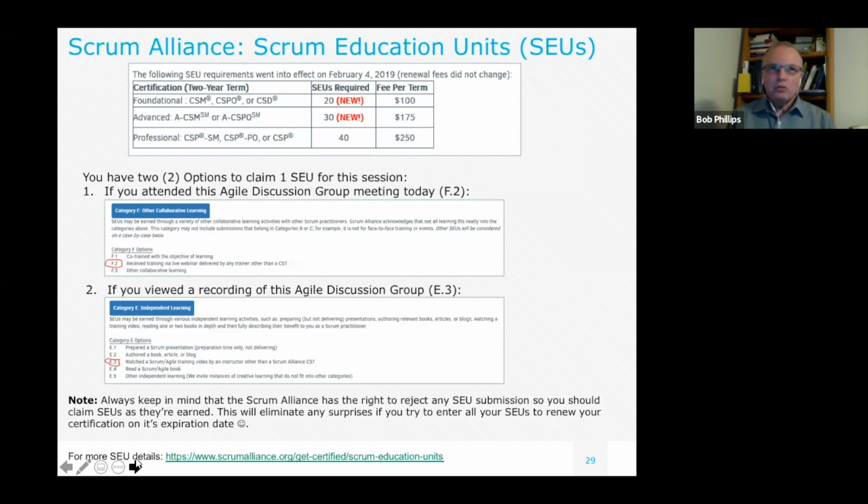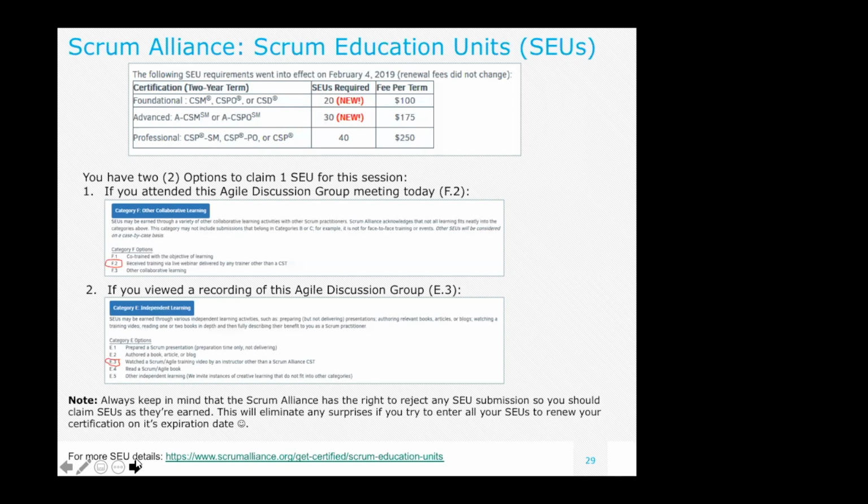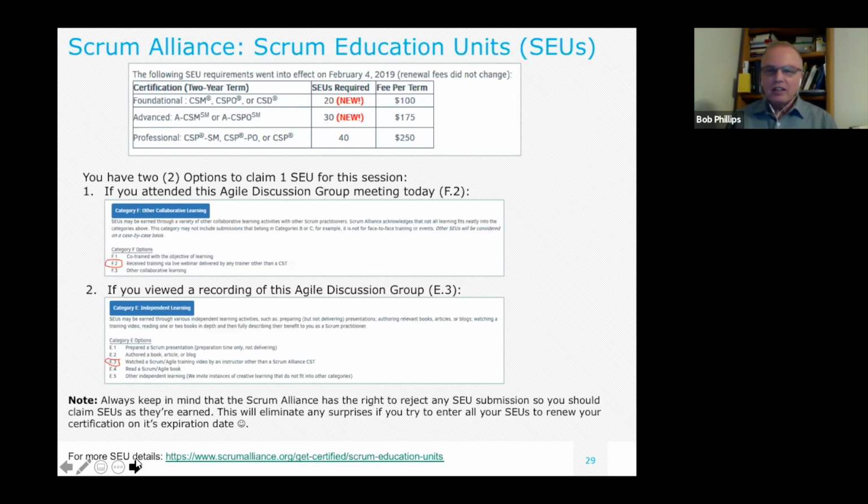Again, if it works for the team, leave it alone. But I would try to get them to convert the t-shirt sizes into story points. That's ideal. But it would be hard to calculate a velocity based on t-shirt sizes. That would be my only reason for wanting to use story points, because the velocity is the average points that the team completes over the last 3 sprints. So it would be hard to estimate what the velocity is based on those sizes.